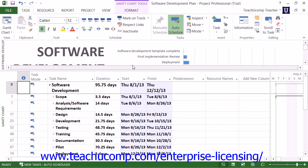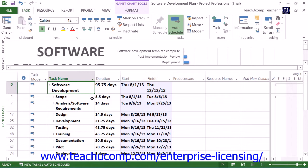Regardless of the end goal of the project, each project must meet its goal to be successful. To accomplish the goal of any project, work must be performed. In Microsoft Project, these are called tasks. Each task will also require resources to be accomplished. Resources that are most often required are work resources, which include employees and other types of labor; material resources, which include materials needed to complete the task; and cost resources, which include any other costs incurred in order to complete the task.